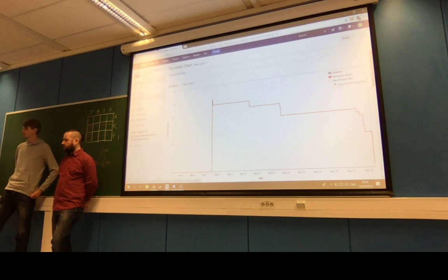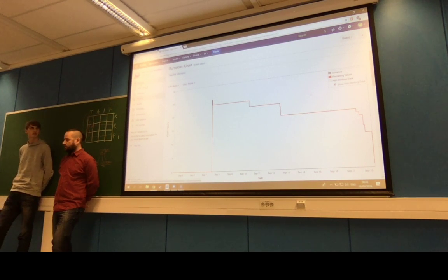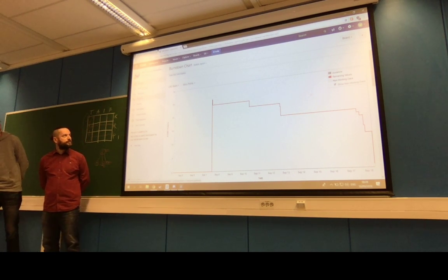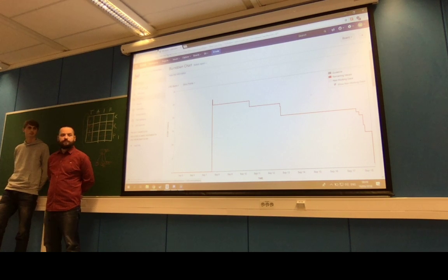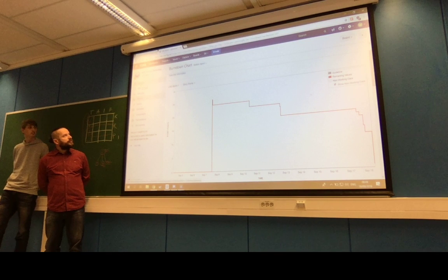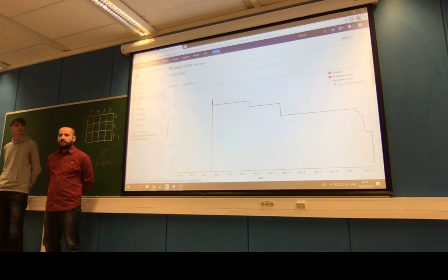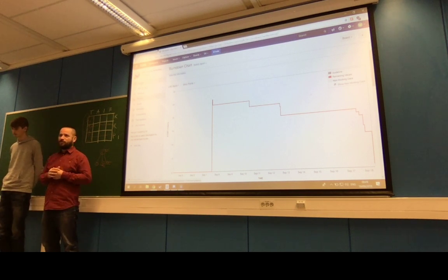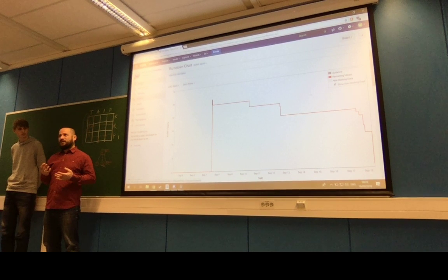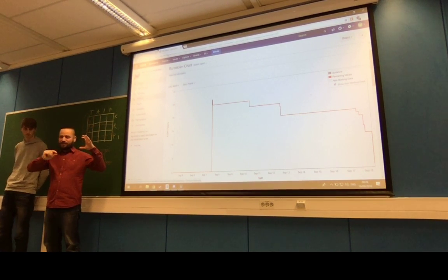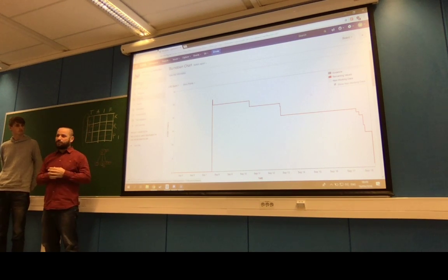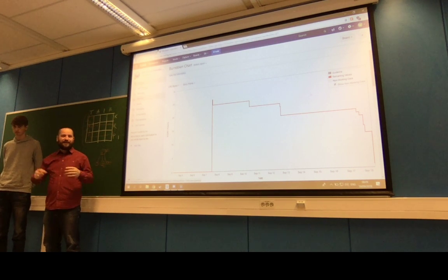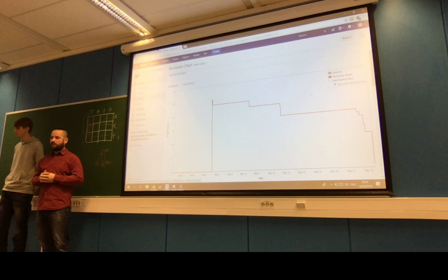A lot of our time is spent on planning in the first place, so probably a lot more ambitious this time. Yeah, so I will increase our story points allocations, so we can have more fine-tuned issues. Because we have some big tasks, issues with 2-3 story points, and then we start dividing them into subtasks just to commit parts of the task. We only had the main estimate for the task, but not the small estimates. So probably it will be more adequate to divide it into subtasks in the beginning and put the estimates only on the subtasks, not on the main task.